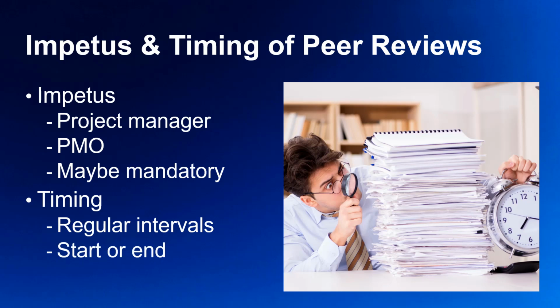Early on in the project is a good time to conduct a peer review. As you should know, it is much less costly to find flaws and introduce changes at the beginning of the project rather than later on in the project lifecycle. Alternatively, reviews can be conducted at significant milestones or at particular points when a project is more vulnerable or at high risk. In sum, peer project reviews are highly individualized.